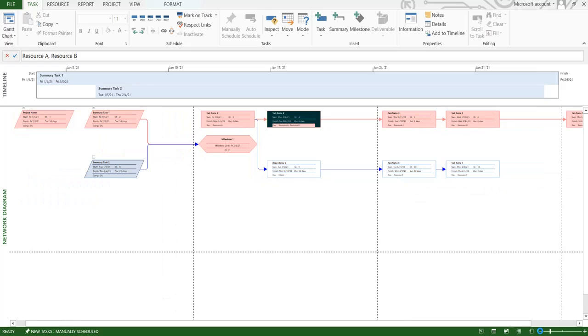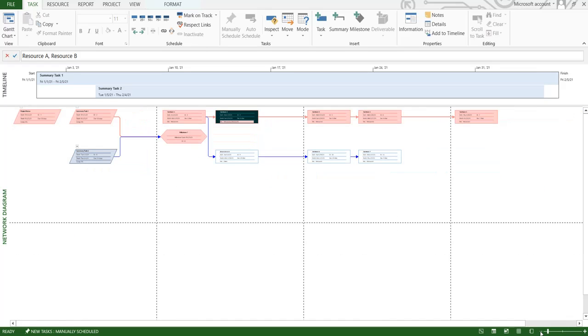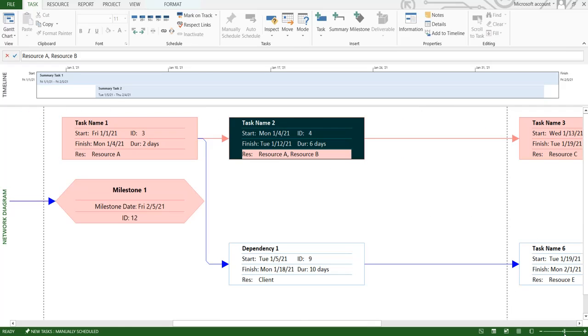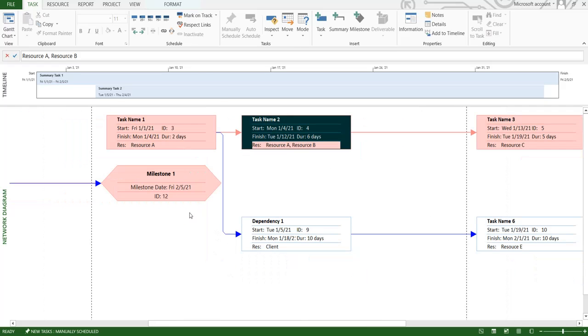You can note that there are some tasks that are highlighted in red color, while some are displayed in a lighter color. The ones in red are basically defining your project's critical path. So these are the set of tasks that will eventually take your milestone forward, your project date forward, or your project completion date forward.